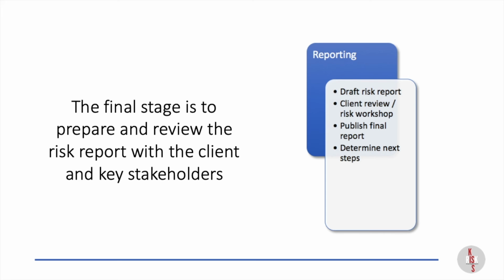The second way to do it is to complete a workshop. Workshops are very powerful, but you have a lot of people in the room and then you start to get group dynamics involved. So normally I try to leave the workshop until a little bit later, once I've done an initial review with key stakeholders to make sure that it's broadly answering the questions that they want before we come into the workshop. And that can cut down a lot of argument and back and forth and questioning.